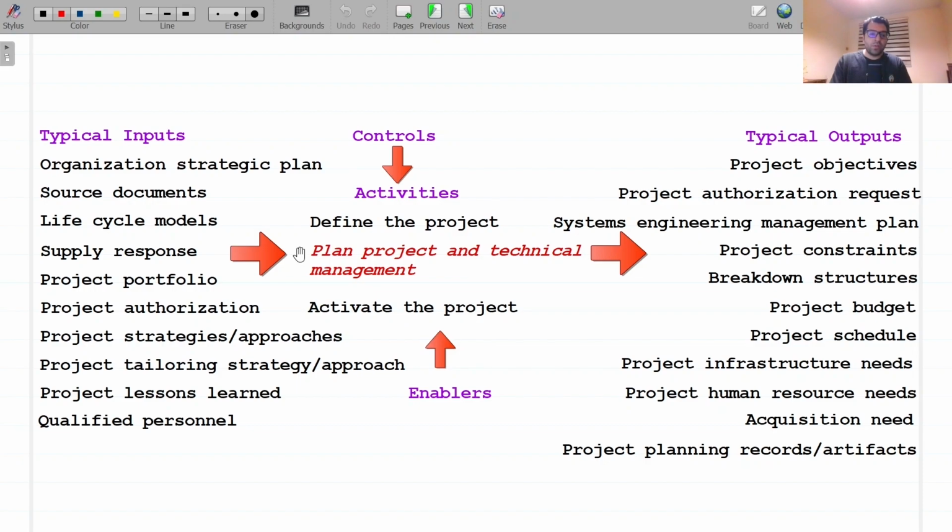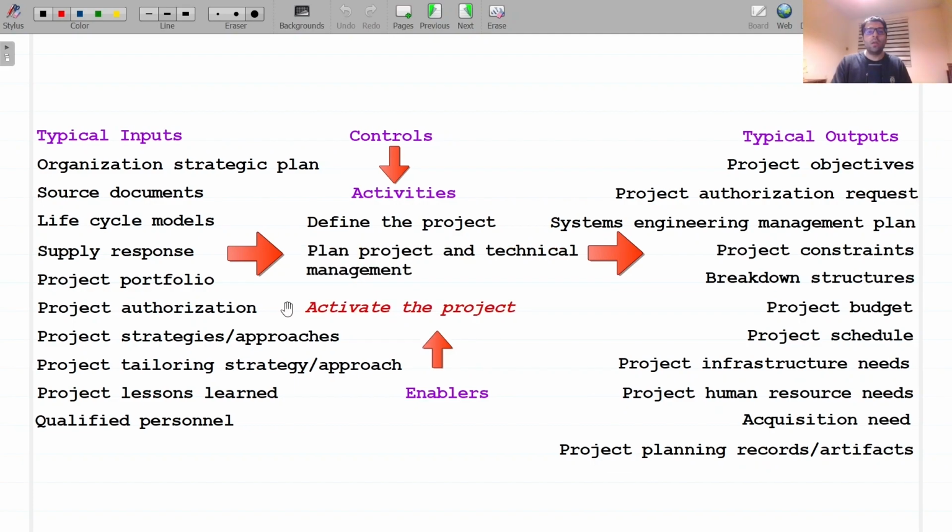Contribute to quality management, configuration management, risk management, information management, and measurement plans to meet the needs of the project with regard to systems engineering efforts, maybe the SCMP for smaller projects. Establish the achievement criteria to be used for major milestones, decision gates, and internal reviews. Establish criteria for project performance.